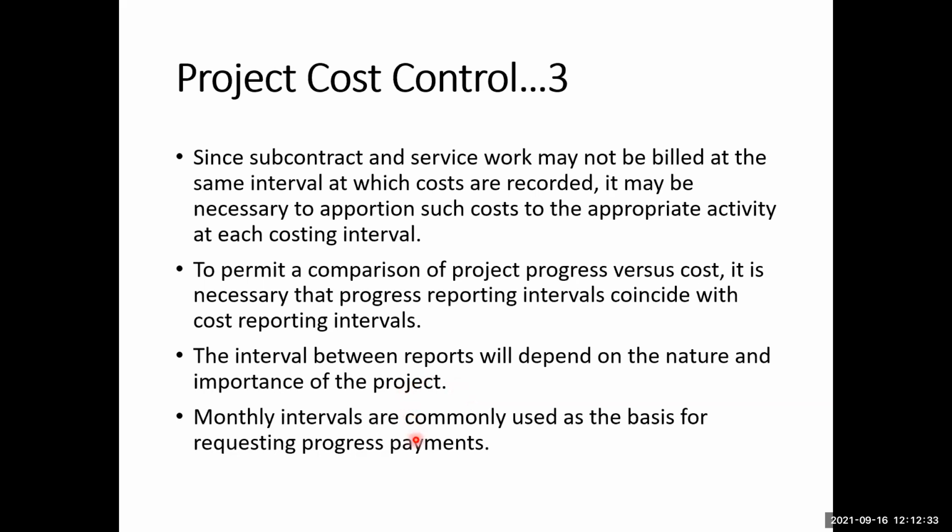But in most cases, monthly intervals are commonly used as the basis for requesting the progress payments. That means whatever work has been done is normally paid on monthly intervals.